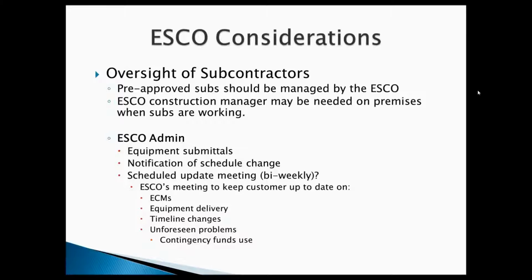All right, now the ESCO's part of administration. They need to submit that equipment for approval. They need to make sure that you are notified of any schedule change, and that could be a lot of things. It could be deliveries not on time. It could be we've decided that maybe it would be better to do this ECM first. So to you and to the ESCO, it is a schedule change and you need to be notified.